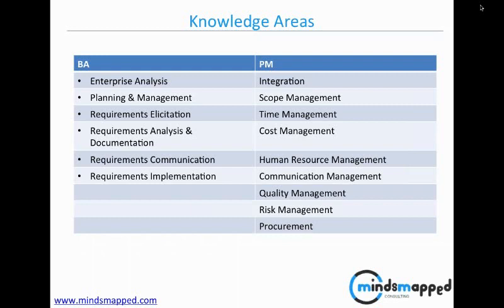From the project manager perspective, when you decide and freeze the scope of a project, if it increases, that will mean either an increase in cost or a delay in timelines, right? It will also mean additional work for business analysts, right? So when we talk about scope, it is very important that the BA and project manager are in sync as to what the clear scope of the project is.